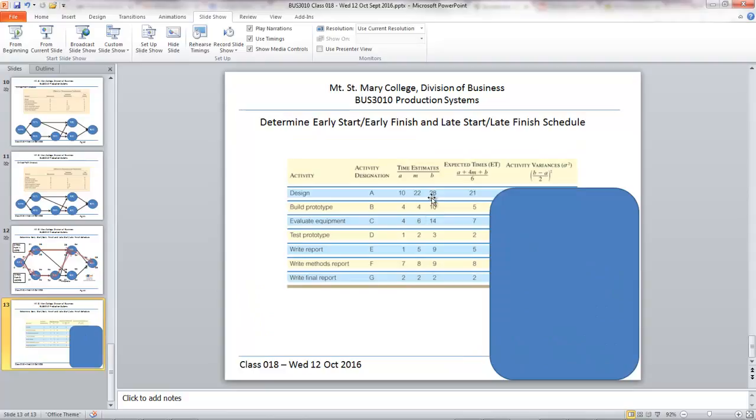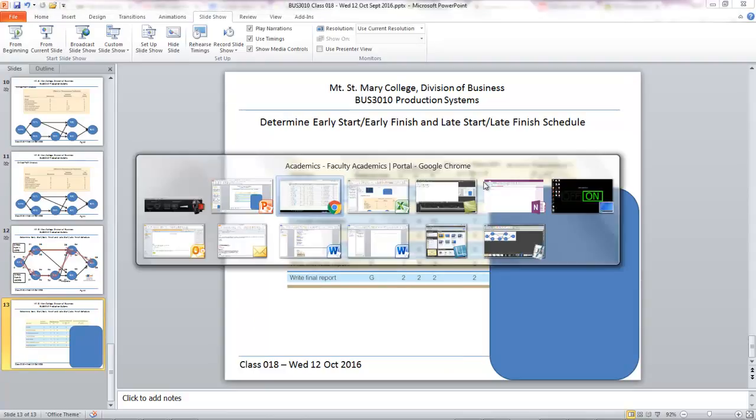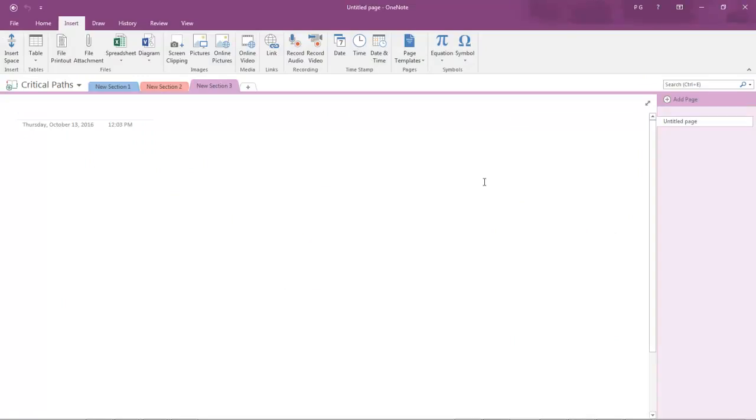They're a function that we calculated, this (A + 4M + B)/6. And just to remind you there, it's a weighting. It's something to do about weighting inputs. We all do this every day. That equation can also be written 1/6 of an A plus 4/6 of an M plus 1/6 of a B. It's kind of like a recipe, all right?